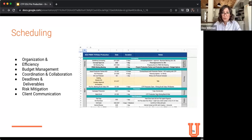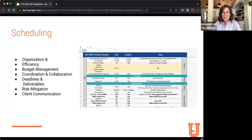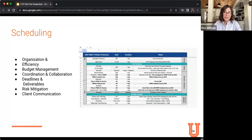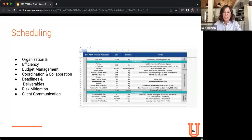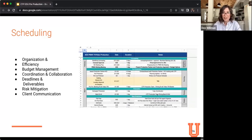Meeting your deadlines is crucial for launching your campaign as scheduled and maximizing their impact, as our media team can definitely tell you. Timelines can also help identify potential bottlenecks or risks in the production process, like knowing you'll need to include time for captioning or file conforming in the very end for post. Gives you ample days for that internal and client review.